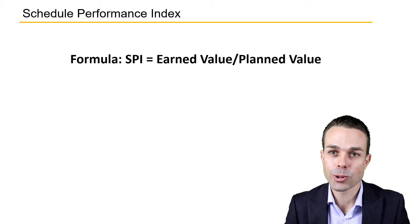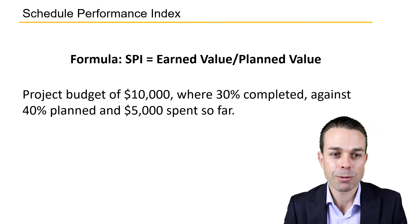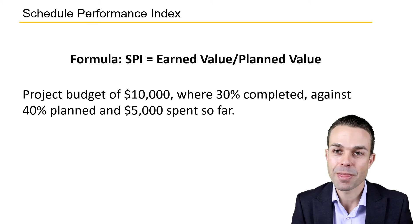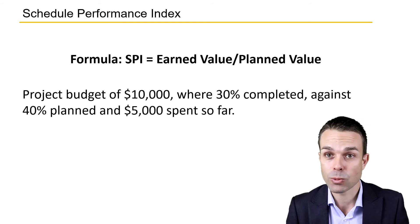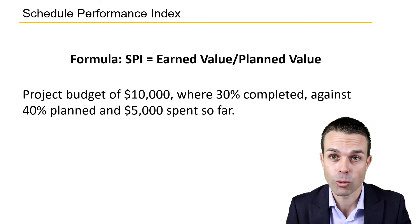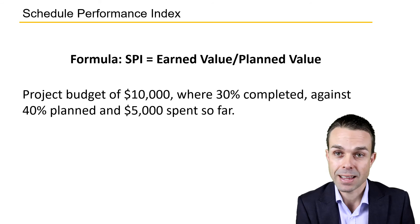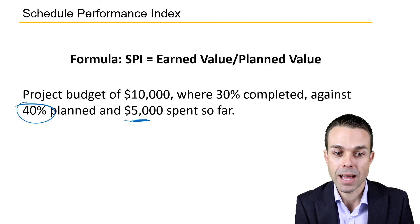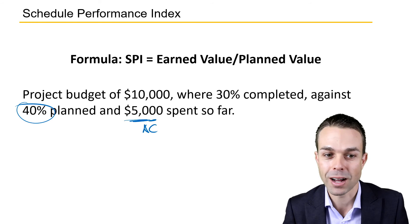Let's look at an example project. Let's say we've got a project budget — a Budget at Completion, or BAC — of $10,000. We're 30% completed in delivering this product, but we had planned to be 40% completed at this stage. Our Actual Cost so far is $5,000.